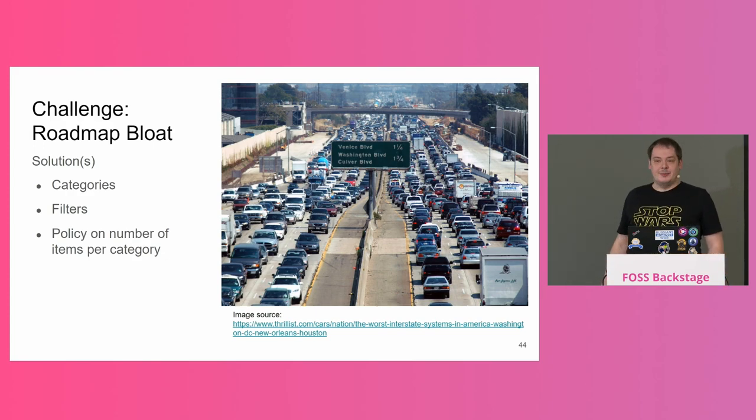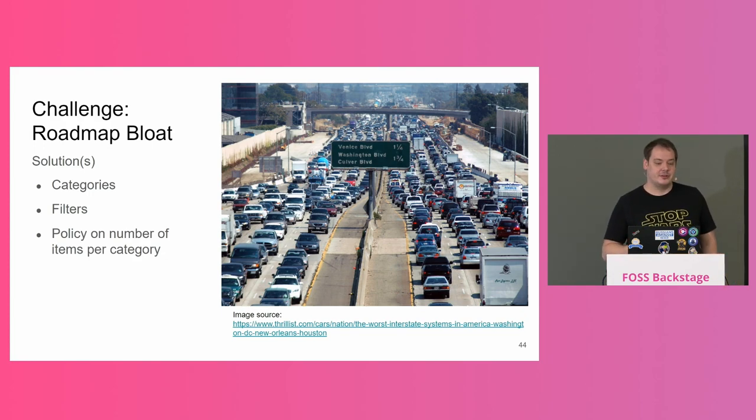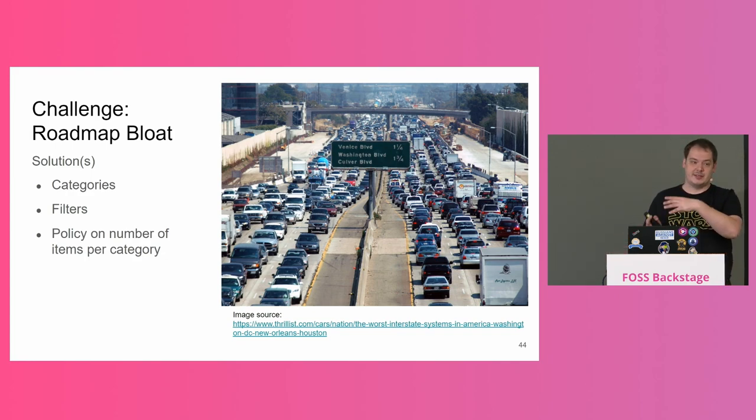On another side, sometimes contributors got too active and created something like 30 roadmap items for minor things, which again was too complicated. And in our case, we had to resort to various kinds of categorization, filters, and policy on items to make this roadmap sustainable.